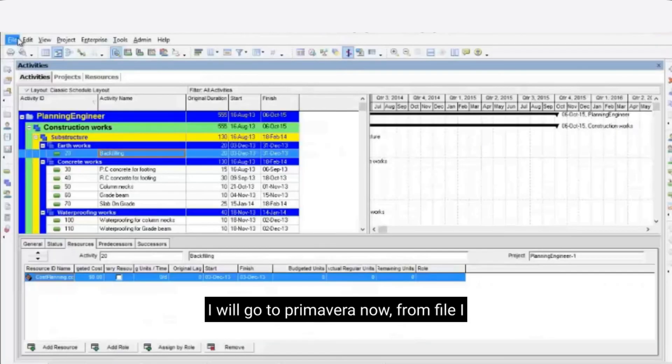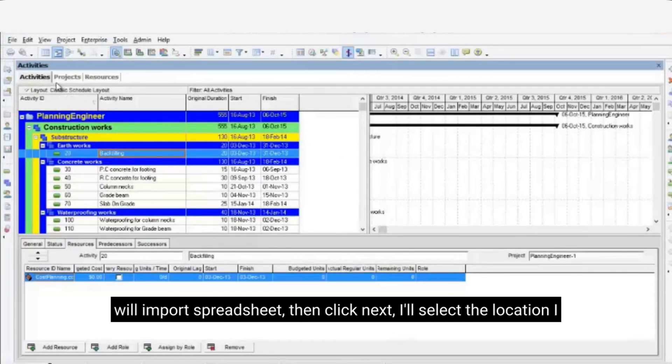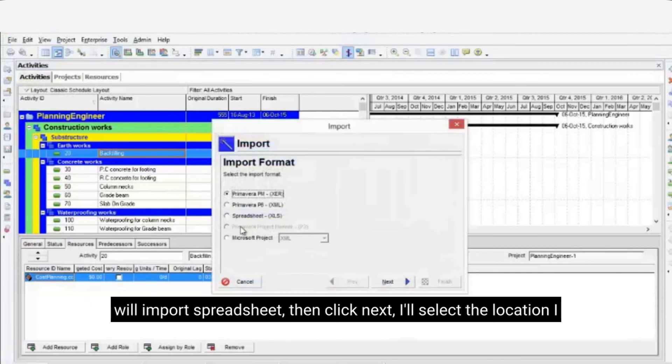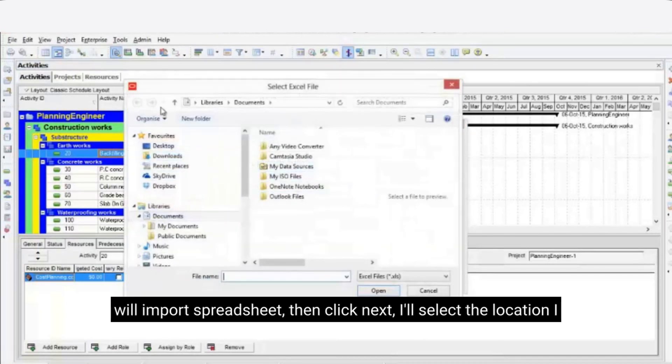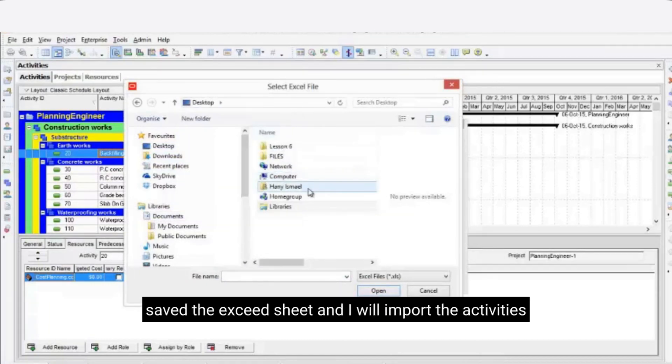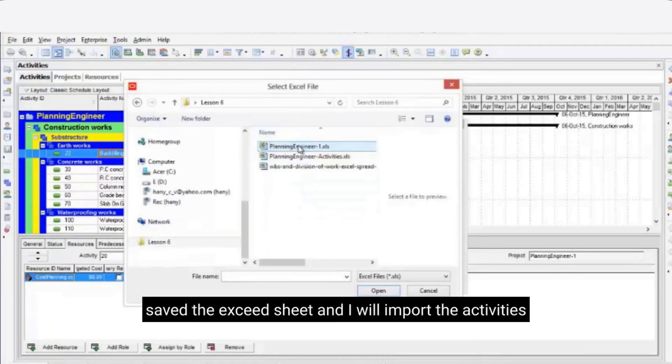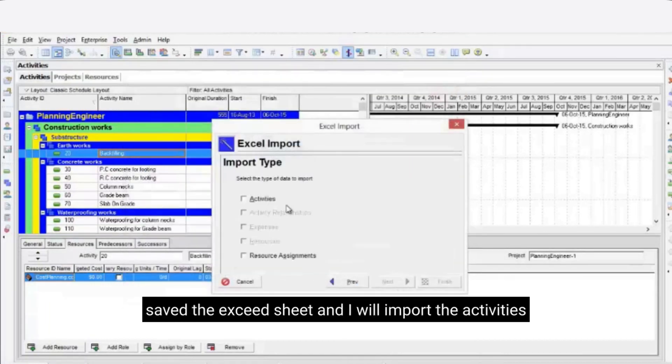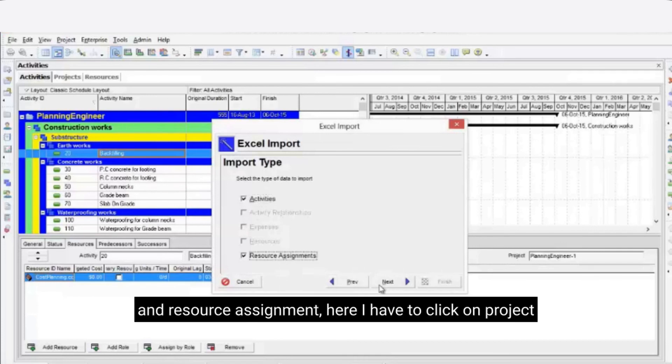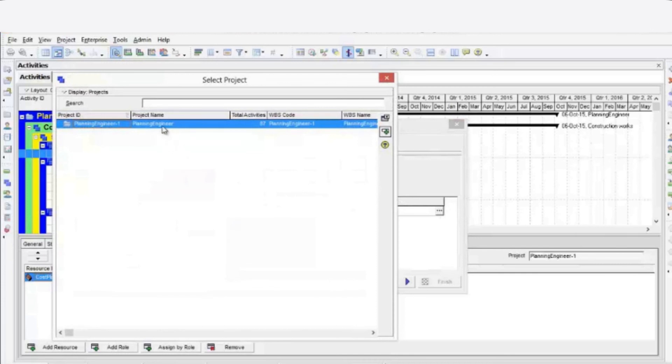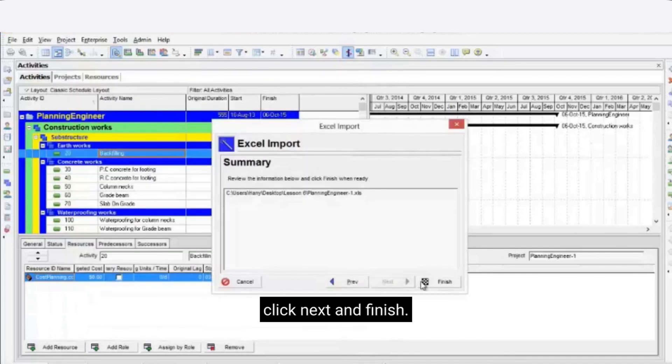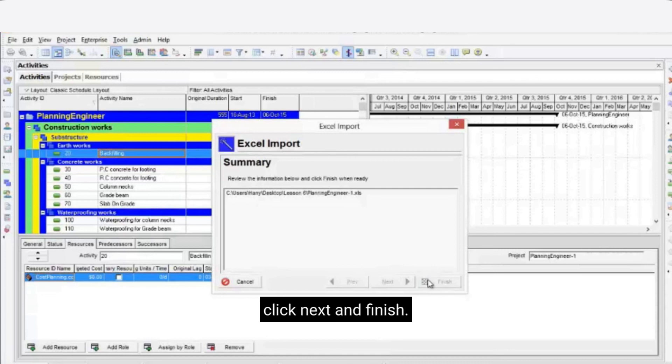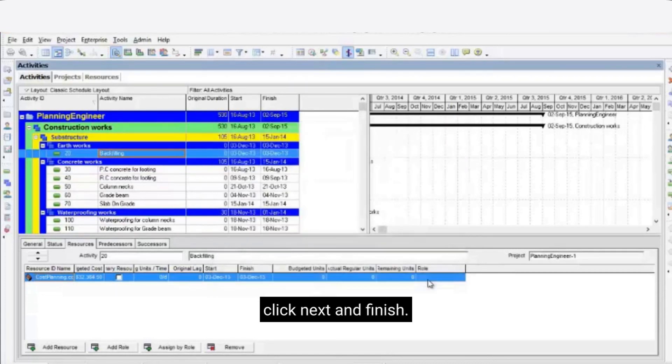Now let's go back to Primavera again from file I will import spreadsheet then click next. I'll select the location I saved the Excel sheet and I will import the activities and resource assignment. From here I will click on project. Click next and then finish. Now the import completed.